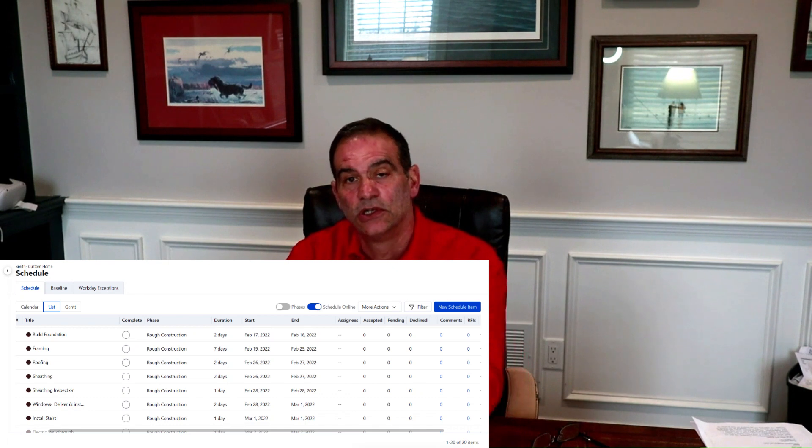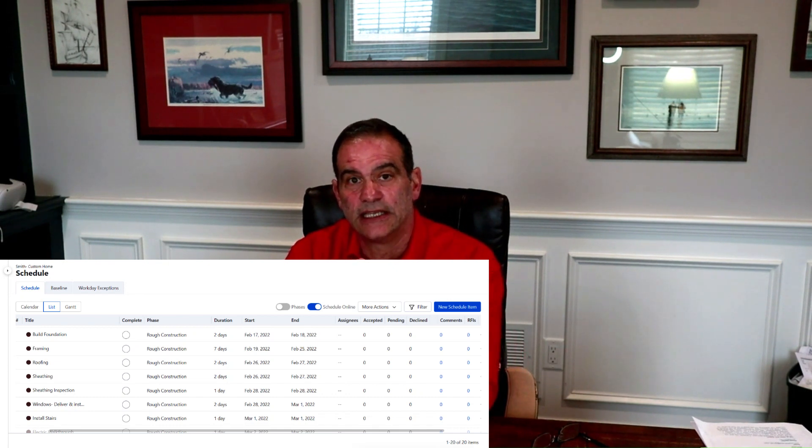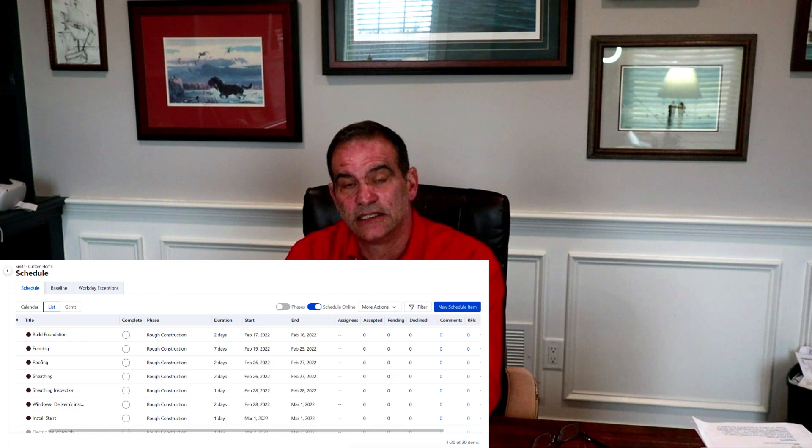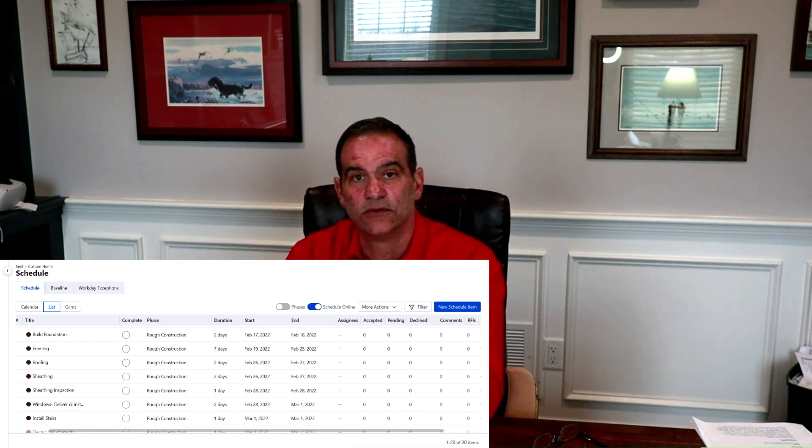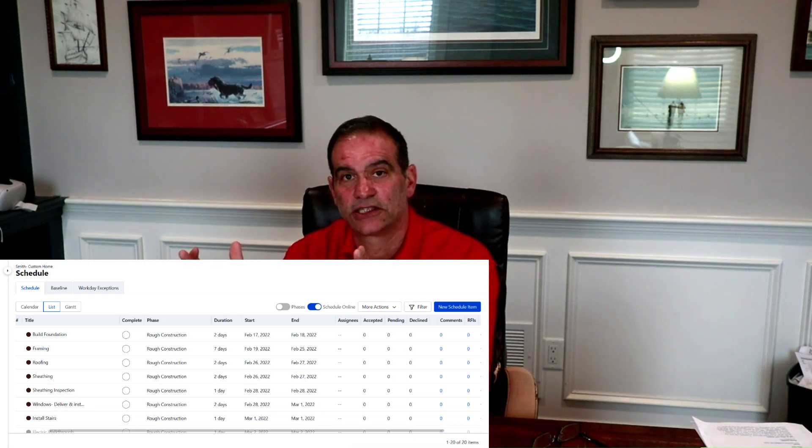One of the most important features of a good construction project management application — both to us as the builder and to our clients — is the scheduling and calendar feature. The scheduling feature allows us to build out a construction schedule starting with day one when we break ground, listing the trades that will be on site, what days they show up, what days they're complete, and then the transition to the next trade. We schedule that out for our complete project.